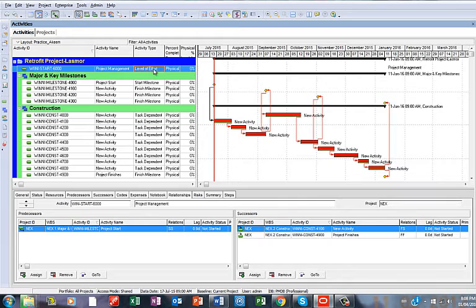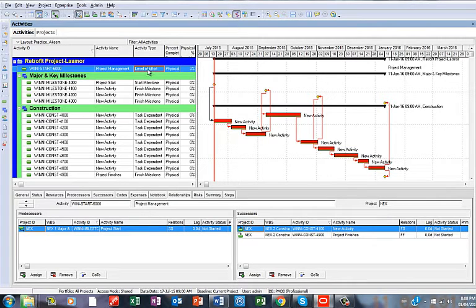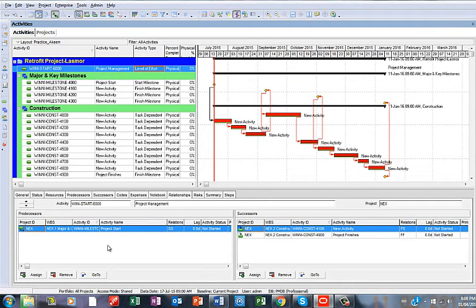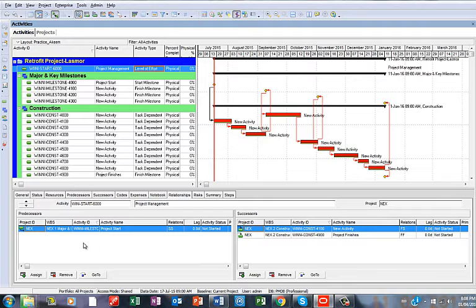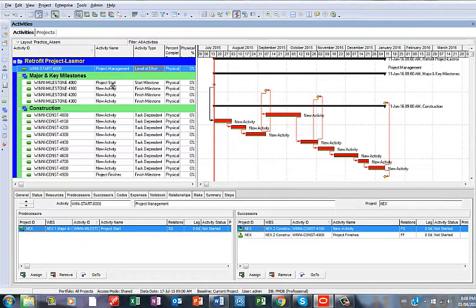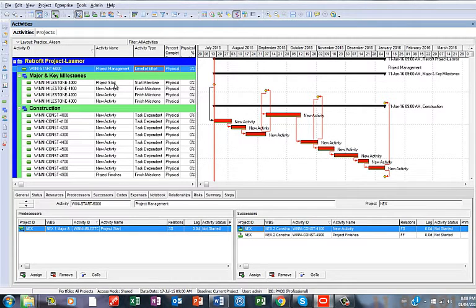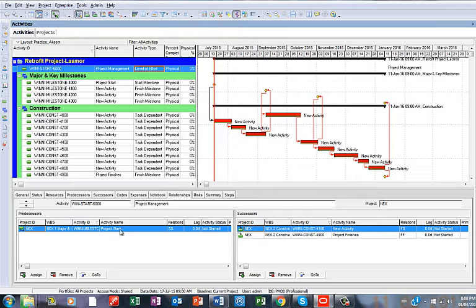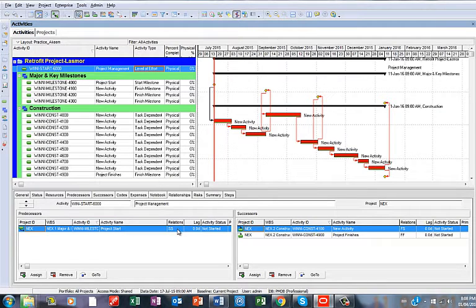So take for instance where you have your Level of Effort here. It's been applied as the activity type. Then when you make your predecessor, which is the starting point you want to roll up from, for example maybe you want to roll up starting from the project start, you can see that. You now assign the relationship as Start to Start.